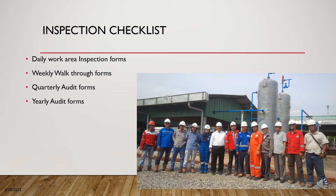Inspection checklists are an important parameter of the evaluation plan. These can include daily inspection checklists, weekly walkthroughs or management walkthrough audit forms, quarterly audit forms, and yearly audit forms. This variety of inspection checklists helps us evaluate the existing condition of HSE implementation at project sites and identify the present implementation condition at the workplace.